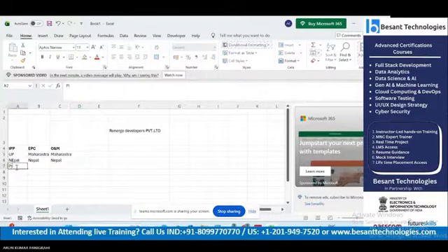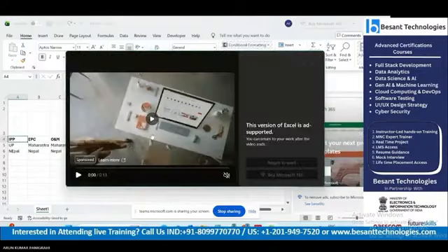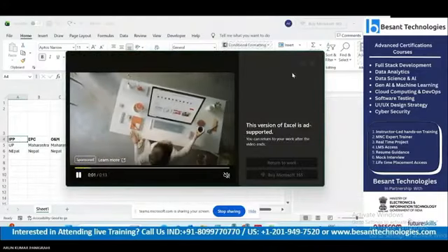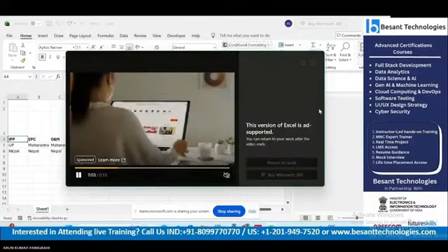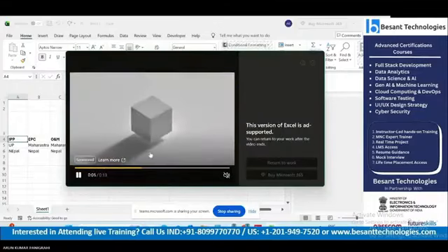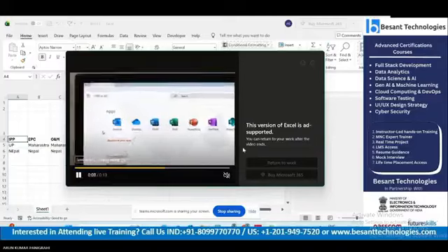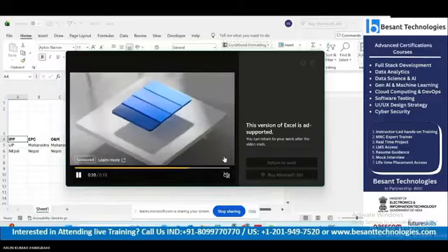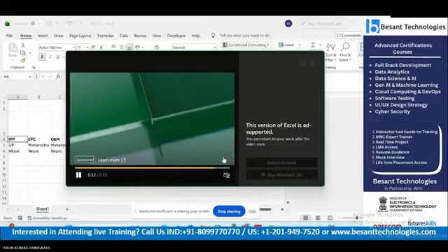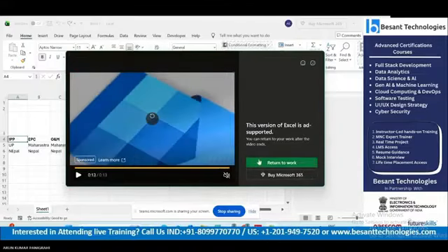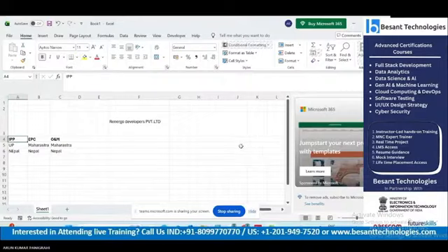There is no need that the portfolio should always be followed by programs and programs followed by projects. We can even have programs and sub-programs. Right now, IPP is a program, and UP and Nepal are sub-programs of IPP. Below UP, you may have project 1, project 2, project 3, and below Nepal you can also have project 1, project 2, project 3.